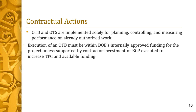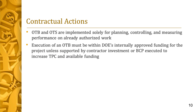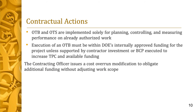Note, as explained later in this snippet, setting BCWS and BCWP equal to ACWP is not a preferred option because the historical efficiencies go away with the elimination of the variances. We can see on the graphic that the baseline to accomplish all authorized work extends well over the contract budget base, as well as beyond the contract completion date. The OTB and OTS are implemented solely for planning, controlling, and measuring performance on already authorized work. The contractor's execution of an OTB must be affordable and within the customer's internally approved funding for the project, unless supported by contract investment. The determination of the OTB value by the contractor does not require current funding to be in place before approving or implementing an OTB and/or OTS.